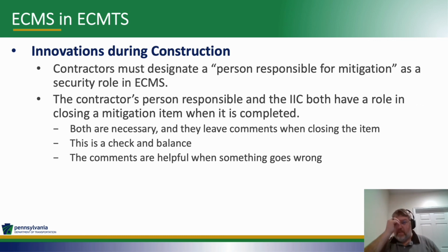So another part of this is the contractor's responsibility, and the contractors must designate a person responsible for mitigation, which is a security role in ECMS. So closing a mitigation activity, say a time of year restriction has ended, both the IIC and the contractor's person responsible need to essentially sign off on the mitigation activity.